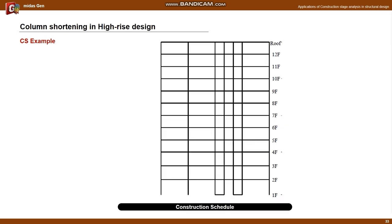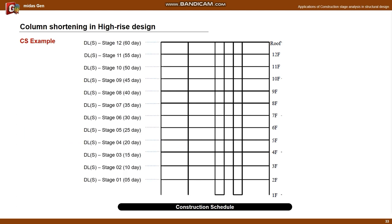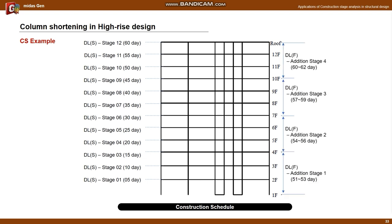The following is the construction schedule drawing for the example. The construction is carried out in units of one story, and the duration for one story is assumed to be five days. Self-weight is reflected at the same time as concrete is poured. In the case of finished loads, after the construction of structural members is completed up to the 10th floor, they are applied to the structure in units of three stories from the lowest floor. Live load is applied to the entire structure, assuming use of the building 30 days after all finishing loads are applied.